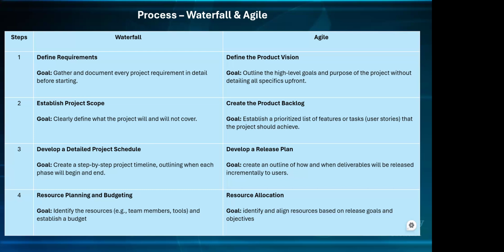So the initiation phase, this is what we want to do in the initiation phase. It's going to be maybe so much time. We want to have a design stage. This is what this design stage is going to be. That can be an example: assigning maybe 2 weeks or more for requirement gathering. So, we talked about the requirement gathering. That would be a schedule that, okay, the requirement gathering time, we used 2 weeks to do the requirement gathering.